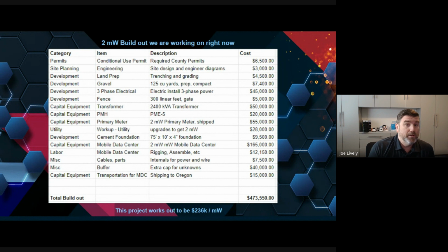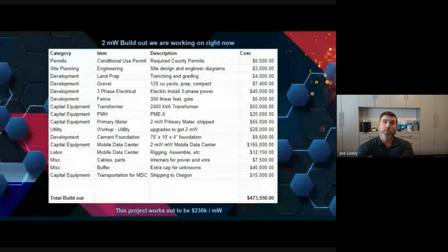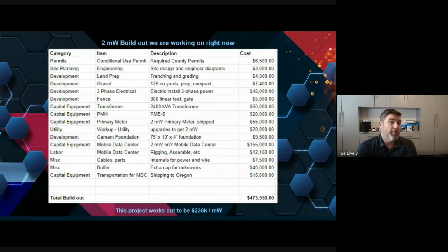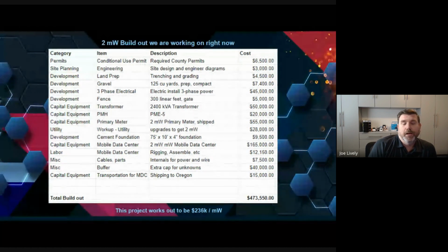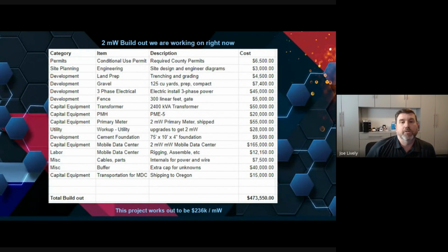It's super important. The one I mentioned up there in North Oregon, where they quoted 175 and it turned out to be 250 for the utility upgrades. There was no buffer in there. And so the primary on there had to end up selling Bitcoin at $30,000 to cover that extra cost. Obviously, he regrets it, but he's up and hashing now with 3 megawatts up there, so he's happy that it's going. But again, he regrets having to sell coin to make the project happen.